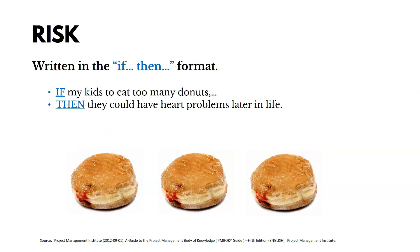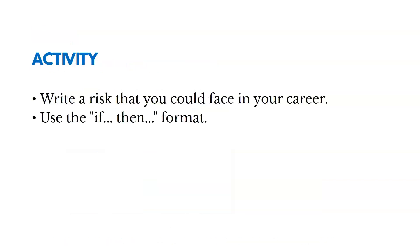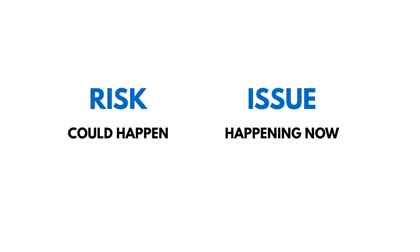Here's an example of how we write risks — we use the if-then format, which makes it easy to understand what the risk is and what the consequence would be. For example: if my kids eat too many donuts, then they could have heart problems later in life. You might want to pause the video and write a risk you could face in your career using the if-then format. Note that a risk is something that could happen, while an issue is something that's happening right now.